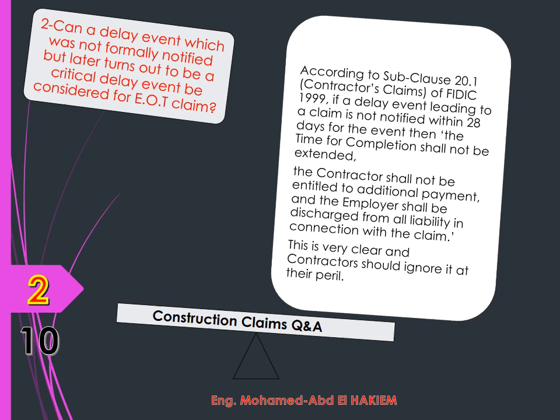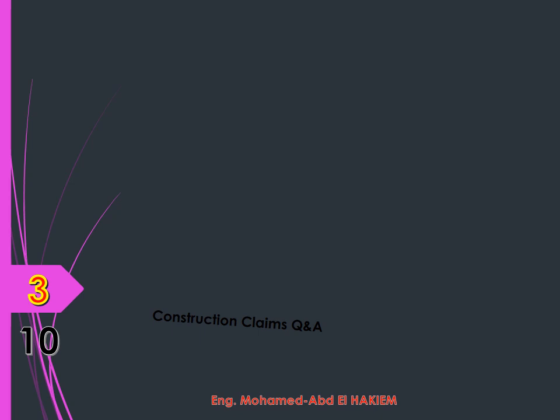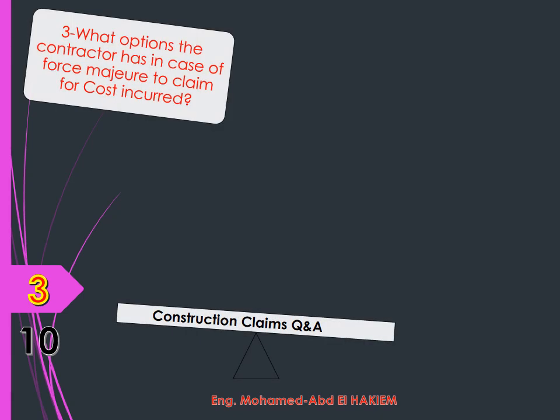Giving and recording advice to the engineer in meetings does not satisfy FIDIC's requirements for the submission of notices as set out in sub-clause 1.3 Communications, so this cannot be regarded as a notice. Depending on the circumstances, there may be situations under civil law jurisdiction where an argument may be put forward to defend against a time bar, but my recommendation is always to submit formal notices as required by the contract. This will avoid having to employ specialists to help get you out of the hole dug by disregarding your obligations.